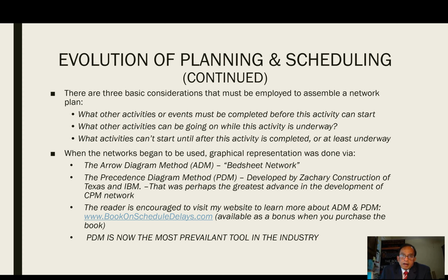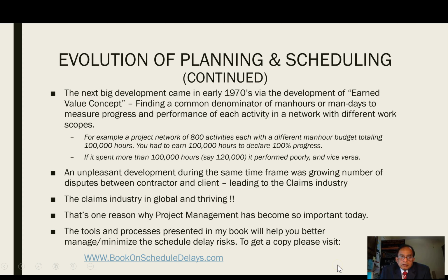PDM is now perhaps the most relevant tool in the industry. The next big development came in the early 1970s via the development of the earned value concept: finding a common denominator of man-hours or man-days to measure progress and performance of each activity in a network, with activities of different scope.